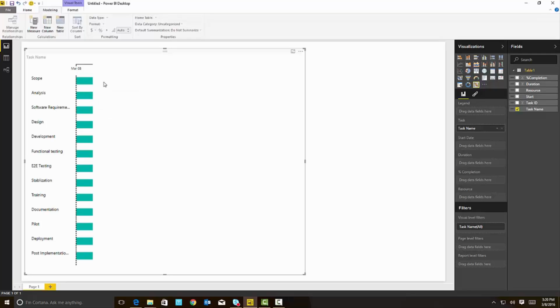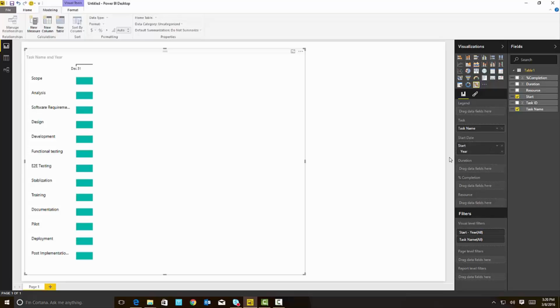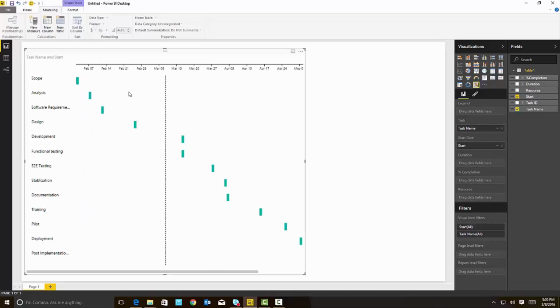Of course, I haven't set up when the task is supposed to begin, so I can do that. You can see here that every task has a certain start time, and it has to be a date field for this to work. So I'm going to put it under the start date. And when I do that, I need to say that I want to have here the full start date. And now we can see where it shows up. Don't use the hierarchy, it really needs the date.